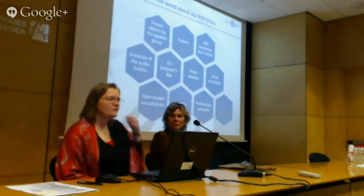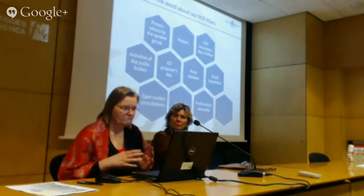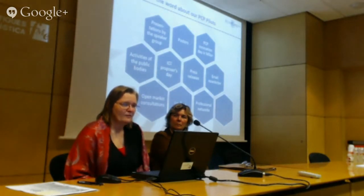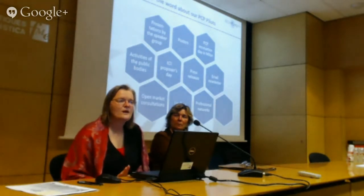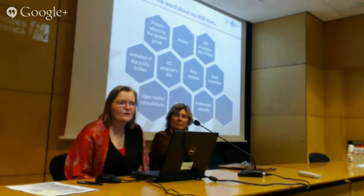Before I come to this point, I would like to explain a little bit how we would like to monitor the progress of the different groups working on the RTD technology development. For our experiments, we have a monitoring platform. Based on our experience with ECHORD, we have quite drastically changed that. So we will have a monitoring session with you every 2 months, but there will be no reports. What we would like to define with you in advance is, based on the technology development that you are doing, which kind of data you can share with us at which point, which allows us to check what you are doing without any obligation for you to write lengthy reports.